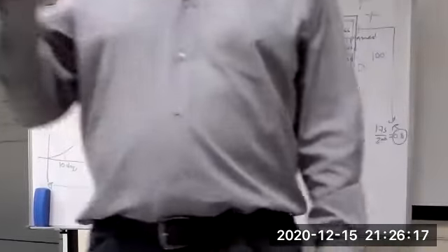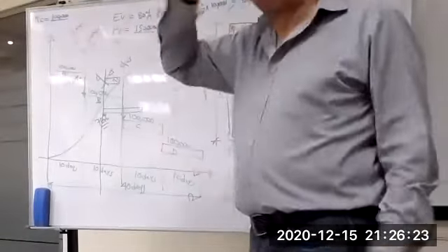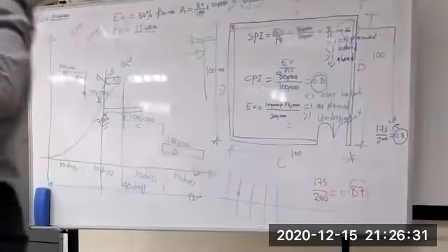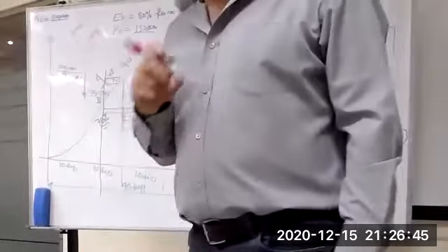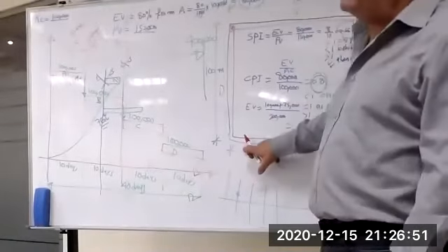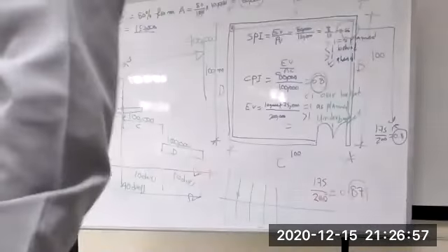There is a software called Built Smart that can give you actual cost, earned value, and planned value down to the level of activity. Imagine, for each work package, you can ask your team why you are behind, why you are over budget. Identify the root cause first. From the root cause, take corrective action. Then is my corrective action effective or not? I measure my corrective action effectiveness.